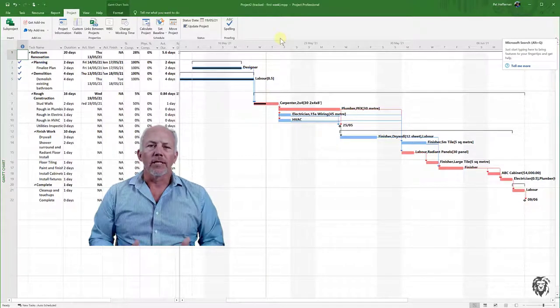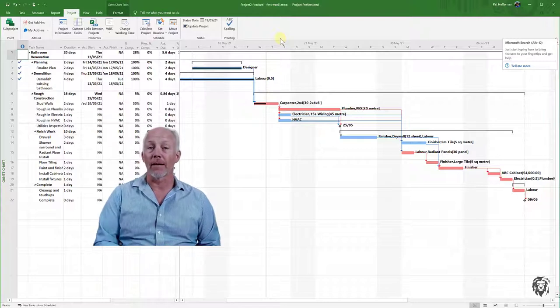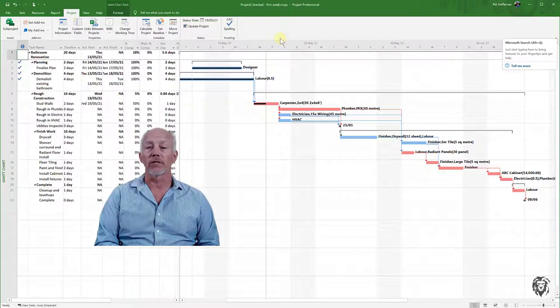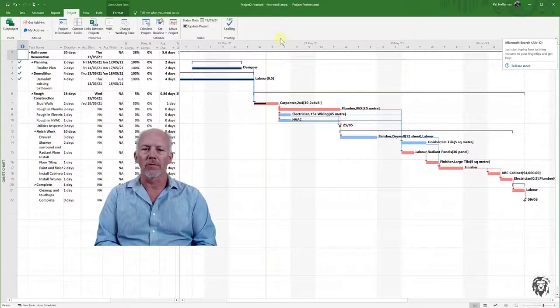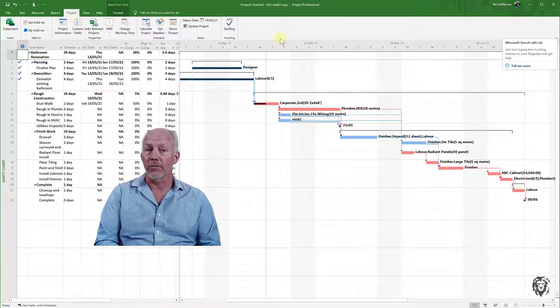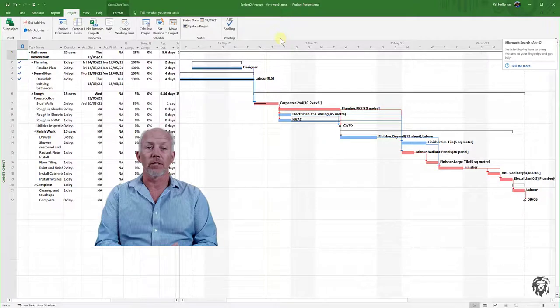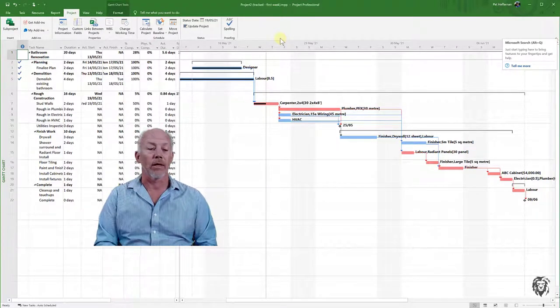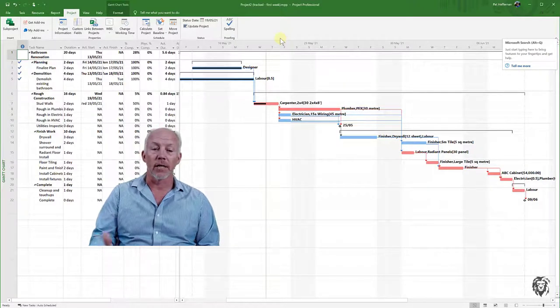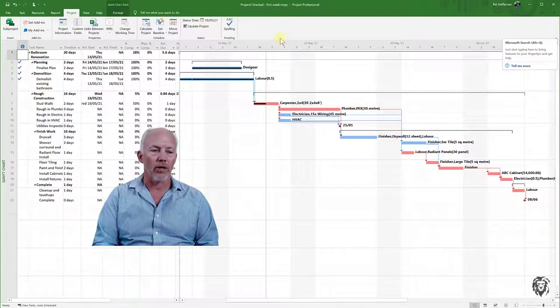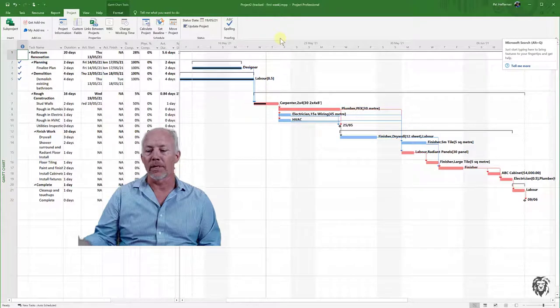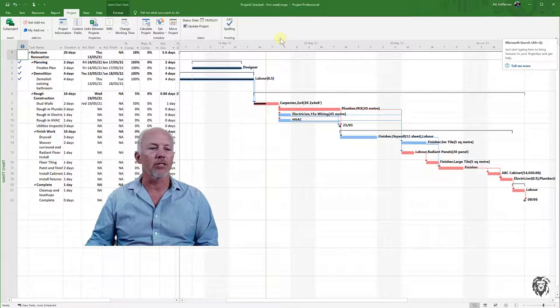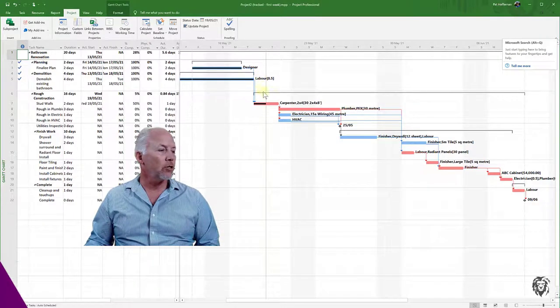Now we have the current date—the green line—coinciding with our status update. There are a number of ways you can spend money to buy time and shorten your project. From a micro perspective, we might need to shorten an individual task so resources are available for other conflicting tasks. In other cases, we're trying to shorten the overall project by working on the critical path to meet legal or contractual obligations. I'll go through a few common methods.